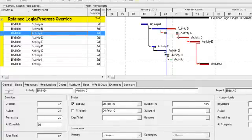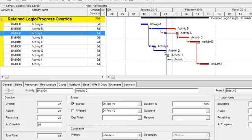So the remaining duration of the successor activity, which in this instance was two days for activity C, is scheduled to begin after its predecessor is scheduled to finish.